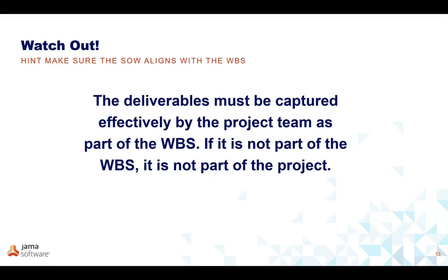Contractors, take note. Be sure your statement of work has the items to each of the elements in the WBS. If you get a statement of work and it doesn't align with the WBS, you need to speak up.